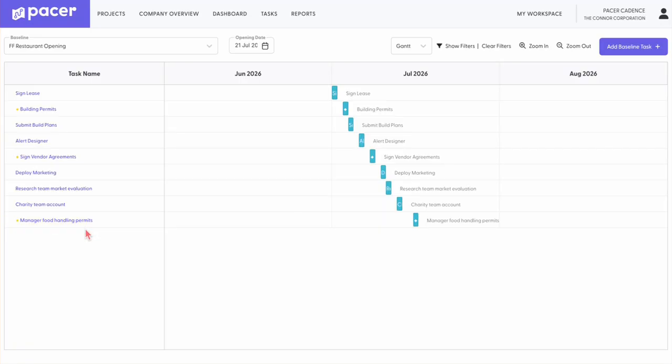So milestones are great because you can designate them as you wish. You can have as many as you'd like, but try not to do too many because you dilute the importance of them. A milestone is expected to be a task that's so important that if the team misses the target date, then it could affect or jeopardize the entire outcome of the project. It may not finish on time. So we have to get our building permits.